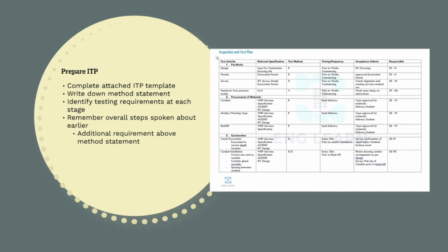Finally, once testing is complete, we'll need to complete the activity closeout requirements. This will involve marking up the design with any required design changes, the process known as redline markups, as well as ensuring the survey and digital engineering team have captured all the as-built data.